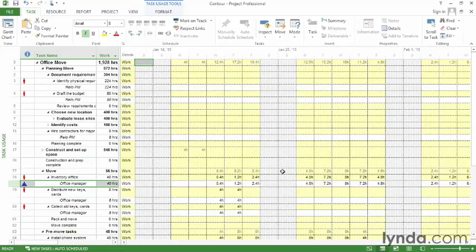And you'll notice a couple of things. First of all, the task takes longer. Now it's going over more than 6 days. But it has to do that because the first day only has a half an hour of work scheduled. You also notice there's an indicator in the indicator column that shows that a workload is applied.